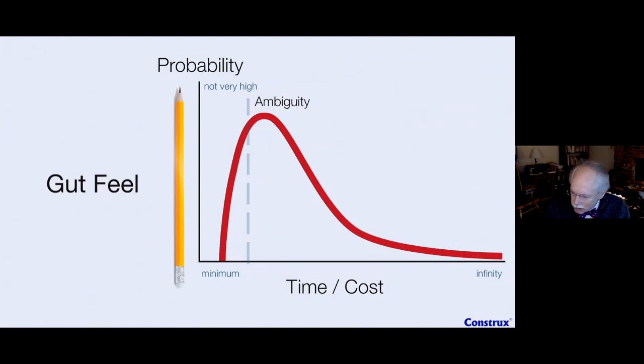Because remember, as we're talking over here, this area over here is only about 25%, right? We said 25%. And so this is not an estimate that's going to happen. In fact, we have a really good chance of ending up over here somewhere, in this zone where we exceeded that point. So how is this going to work? Well, when we talked about making a promise, since we are likely over here, but we're choosing this point here, we don't want to promise this. This is not a promise by a long shot. And in fact, I don't think it's even good for making plans.